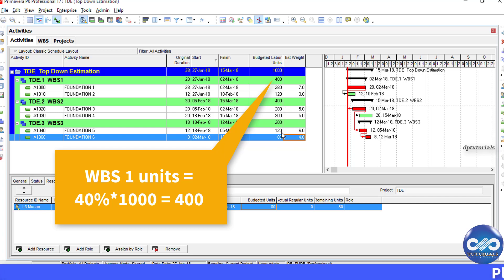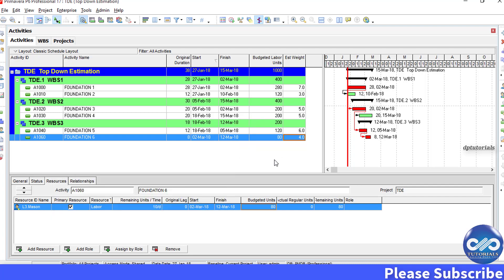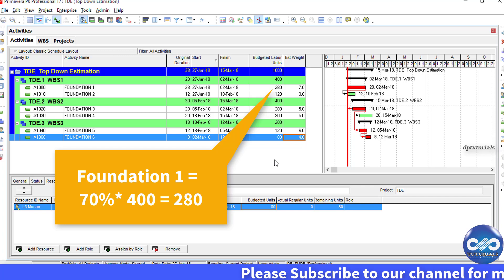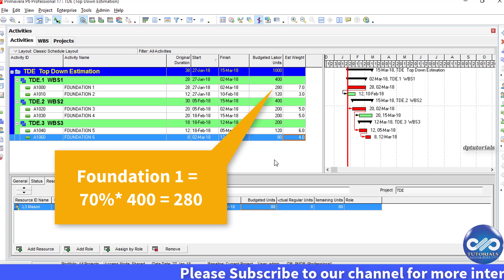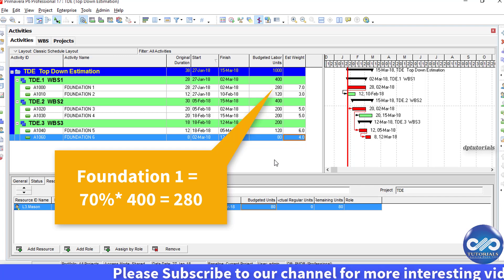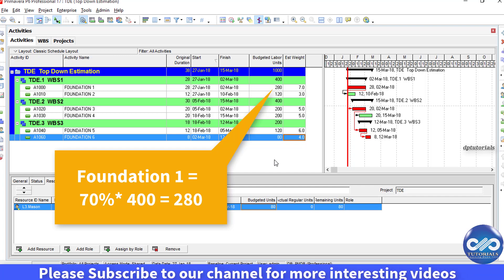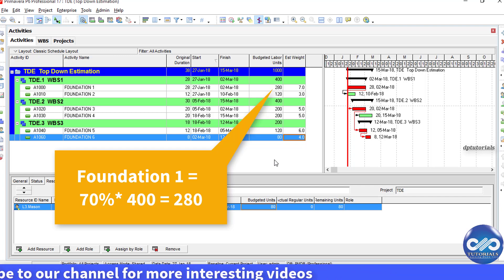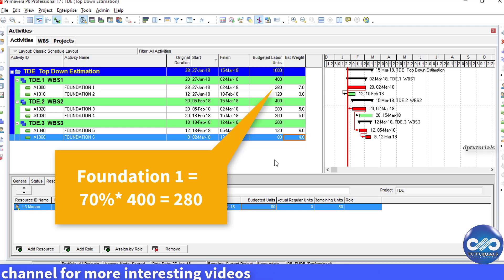And out of 400 units, 70% will be given for the Foundation 1. So, 70% into 400, that is 280 units. Got it, friends?